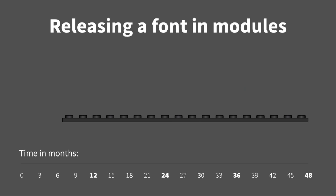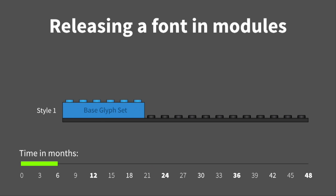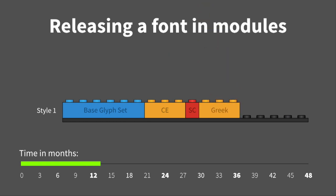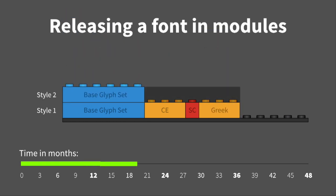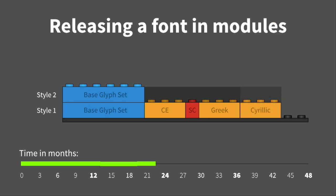Okay, so if you go to release a font in modules, let's see what it looks like. So on the bottom, we've got a timeline there. You can see we've added the base glyph set, and this took about six months. And we added, you know, we decided we'd add some central European, another three months. How about some small caps up in there, one month. Some Greek. Time's going. Oh, look, we added another style. Something interesting there is normally this traditional method, we wouldn't ever dream of releasing fonts without parity and style. But one thing that did happen around the same timeline is we were doing open source fonts. And we were just releasing often. And it seemed that users were happy with that. They were happy to have the fonts earlier.